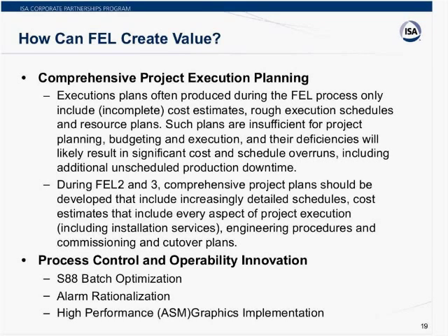Oftentimes we've seen project plans and estimates put together that are helpful, but they're not complete. Estimates that include engineering and hardware and software, but don't include installation or maintenance costs. And so again, it's very important as you put estimates and schedules together that they're comprehensive. That when we say it's a total cost, it's a total cost. It includes everything. That when we put schedules together, it's detailed enough, and that the project can be executed based